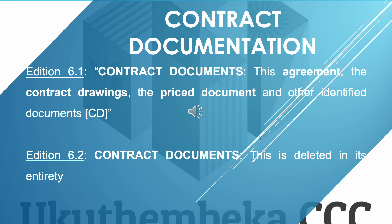The Edition 6.2 includes by express reference the contract drawings and the price document in the agreement definition. The Edition 6.1 definition of contract documents read: 'the agreement, the contract drawings, the price document, and other identified documents in the contract data.' Edition 6.2 does not have a definition for contract documents at all, because reference to contract drawings and the price document is now included in the agreement definition — it has been deleted in its entirety.